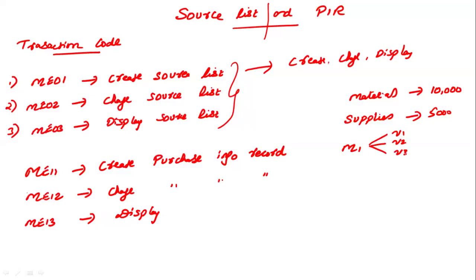And this supplier might only deliver the goods in a certain time period. If you take an example of Europe, they take a summer holiday of 1 month. In that period, the suppliers will not be able to deliver any goods. If you're buying import material and your supplier is in Europe, then in this summer period of 4 weeks, you will not get the material delivered. So every information needs to be stored in the system.